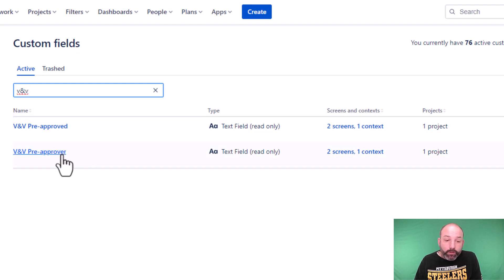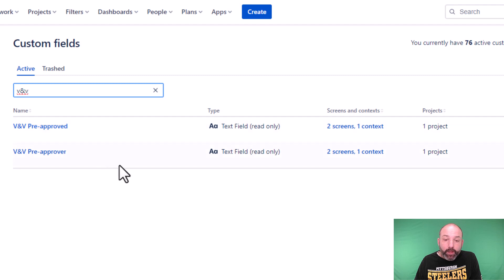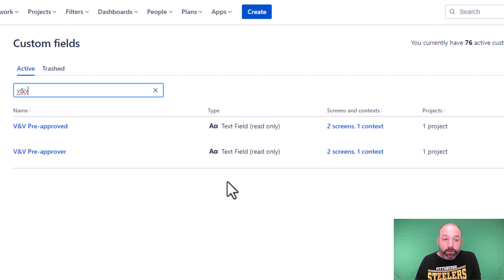Pre-approver is used for the name and ID of the pre-approval, and pre-approved is where we store the timestamp. And what's important here is that both of these fields are of the type text field read-only. This is how we can ensure that users are not able to edit these fields directly.